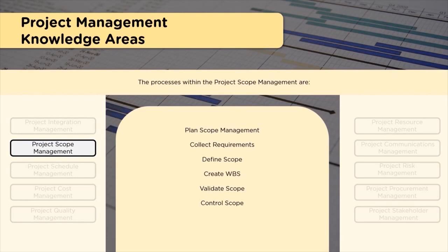you will be assigning activities, assigning resources, effort estimation, cost estimation, sequencing those. All this will be done later. The basic thing needed is the work breakdown structure for that. So to create the WBS, the technique called decomposition is used, and this is a top-down approach.